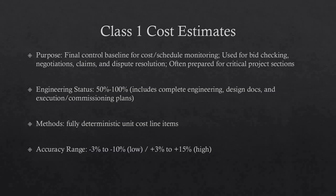Class 1 estimates form the final control baseline against which all actual costs and resources are monitored for budget variations. They also support bid checking, vendor and contractor negotiations, and claim evaluations or dispute resolution. Class 1 estimates involve the highest degree of deterministic estimating methods and require significant effort, prepared in extreme detail and usually focusing only on the most critical project areas. All estimate items are unit cost line items based on actual design quantities. Typical accuracy ranges are minus 3% to minus 10% on the low side and plus 3% to plus 15% on the high side.